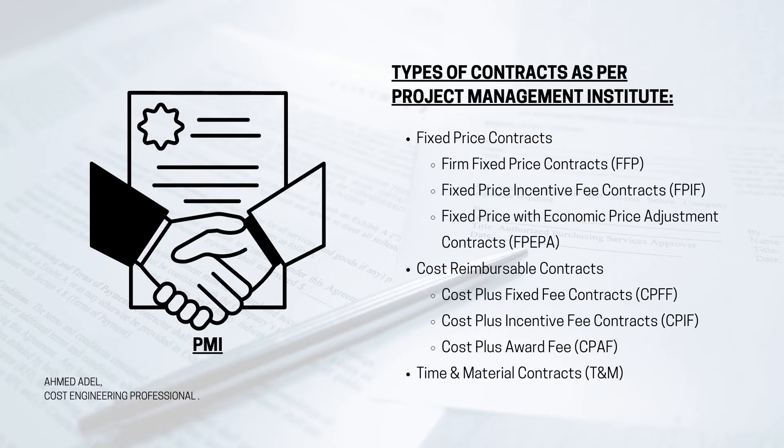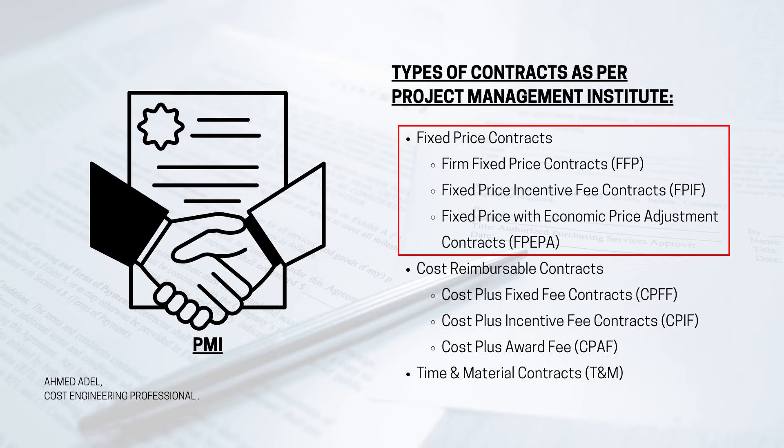Now, the types of contracts as per PMI. Under fixed price contracts, PMI identifies three subtypes: Firm Fixed Price (FFP), Fixed Price Incentive Fee (FPIF), and Fixed Price with Economic Price Adjustment (FP-EPA). The Firm Fixed Price contract is straightforward — a building at 40 million, and as long as there are no scope changes, the price stays at 40 million. The client is unaffected by changes in material prices like steel.